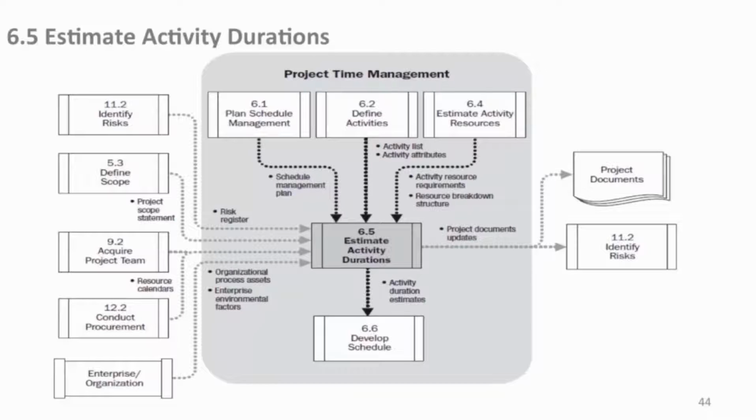So here's our data flow diagram. The typical players, as we should know by now, come in to help us and guide us through this. Our schedule management plan, risk register, of course, now it's activity time. And this is the little example I gave about waiting for something. That's a risk. What if it doesn't happen? Or if we can coerce the supplier to get it earlier, that's an opportunity risk. So you may have two risks, a risk that they won't make it, and then an opportunity risk that we could capitalize on if we can get it earlier.